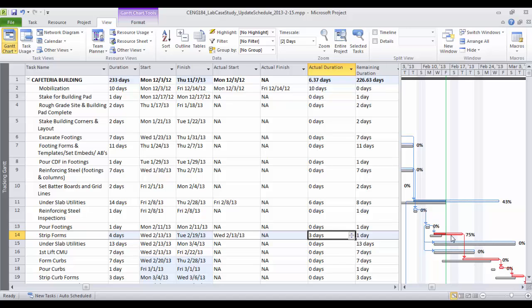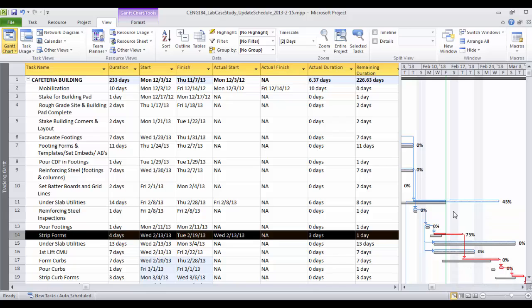I mean, sometimes you get confused. Now I have a longer bar here to the right. Yes, it's longer because you actually have holidays or a weekend. So you only have 1 working day here. So you did 1 over total duration, actual plus remaining, which is 4. So you did 75% progress so far. You only have 25% left to finish.